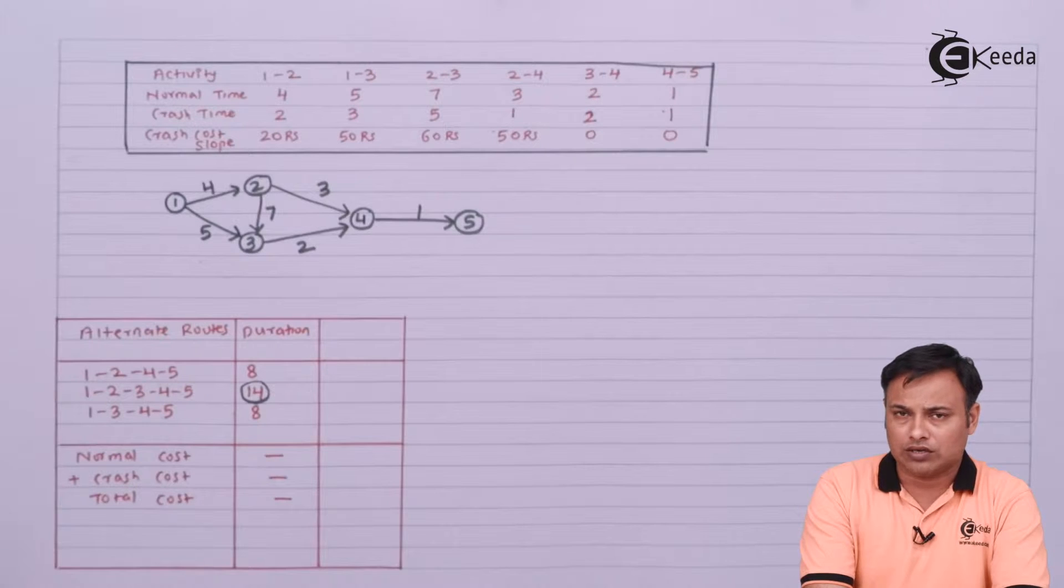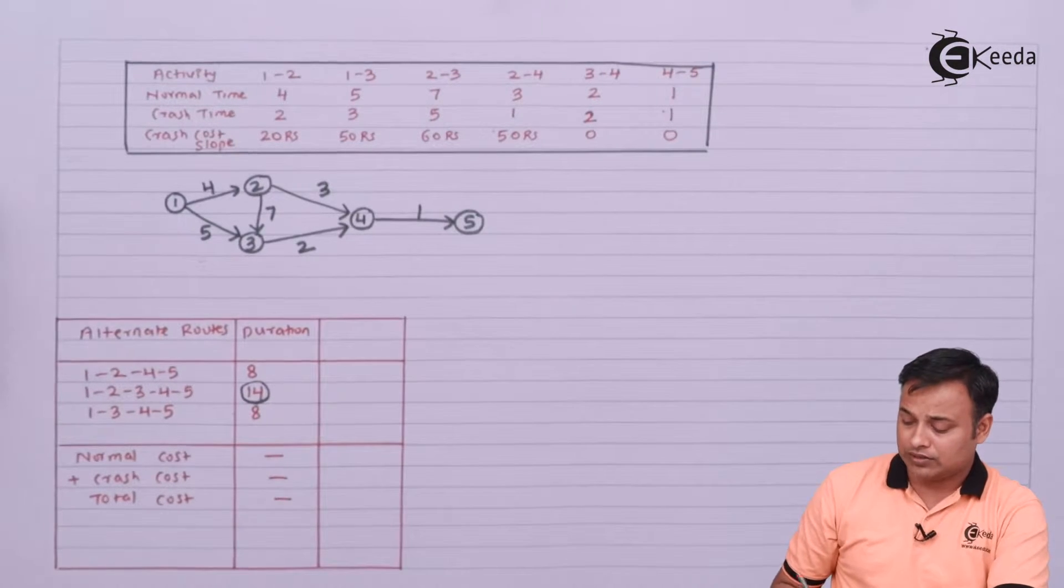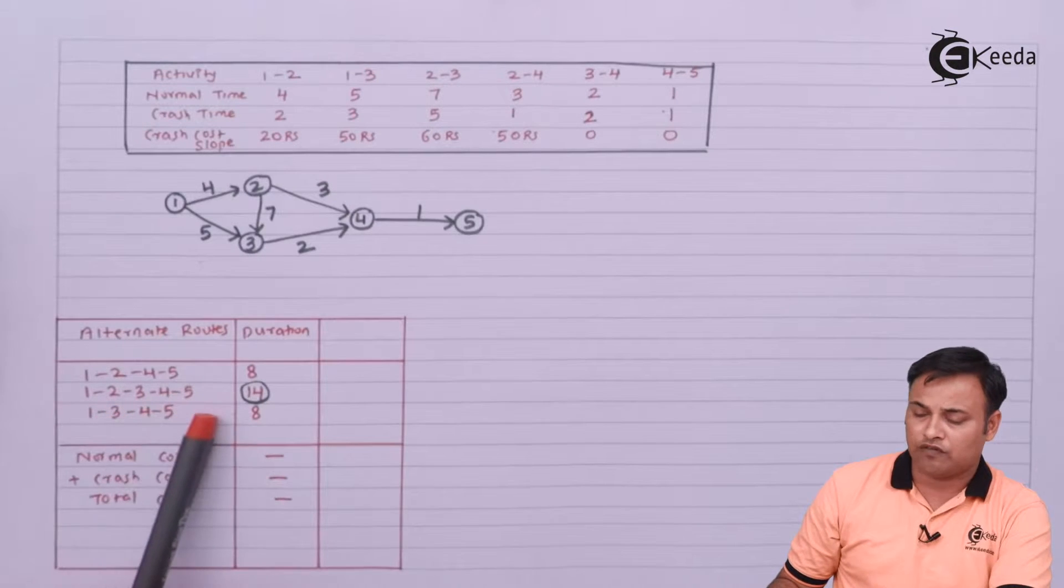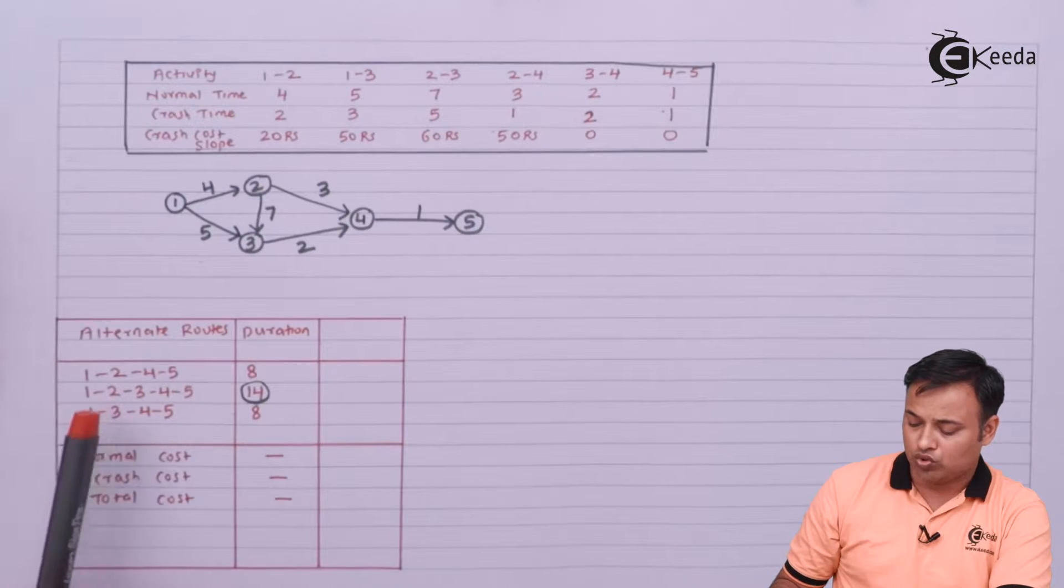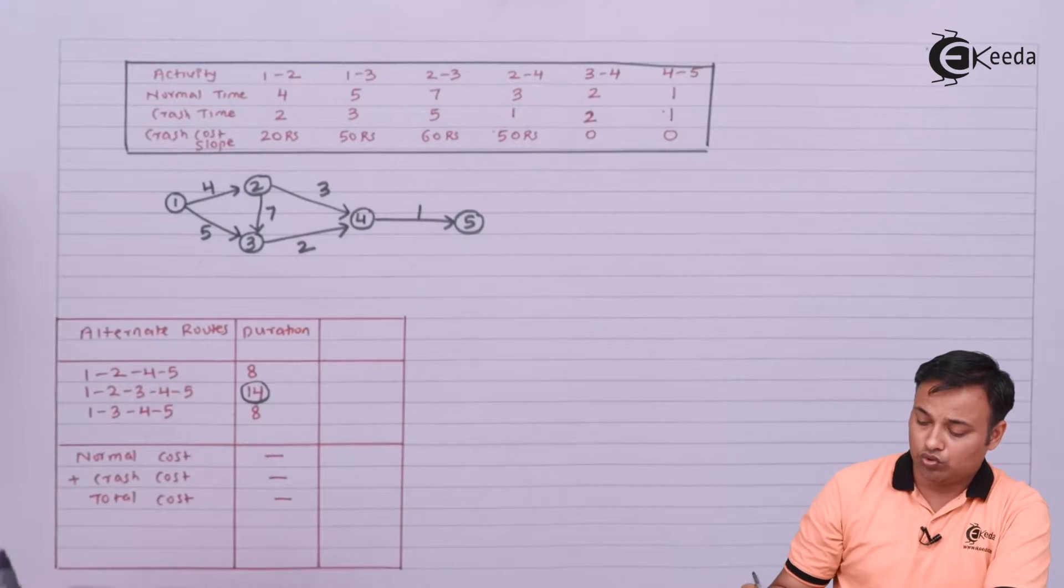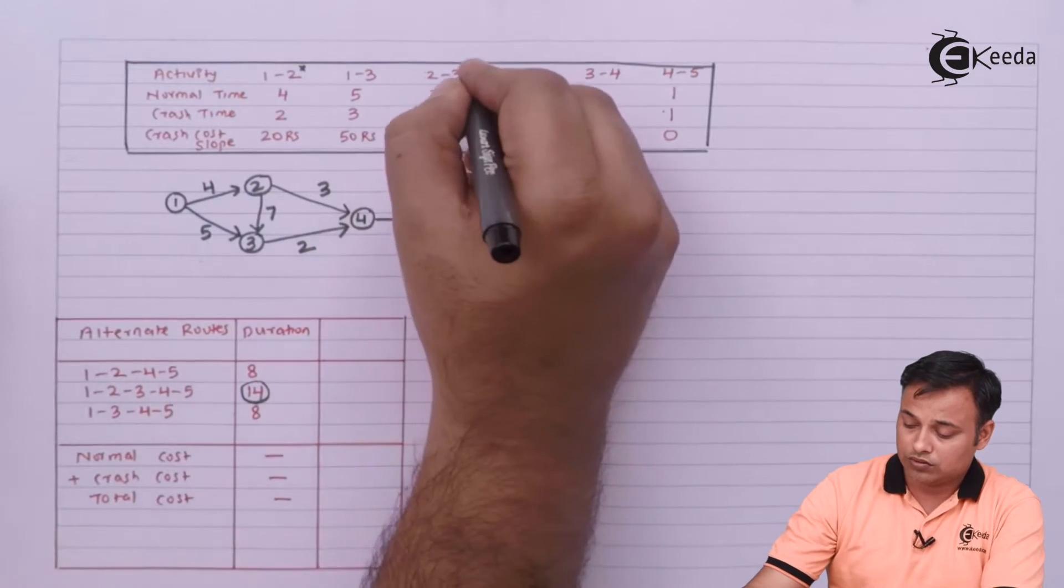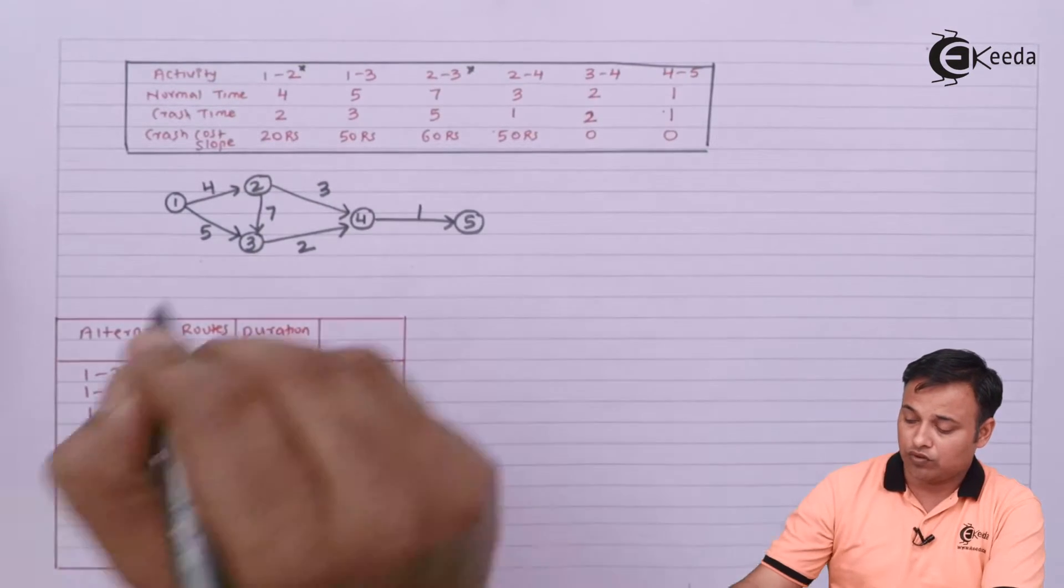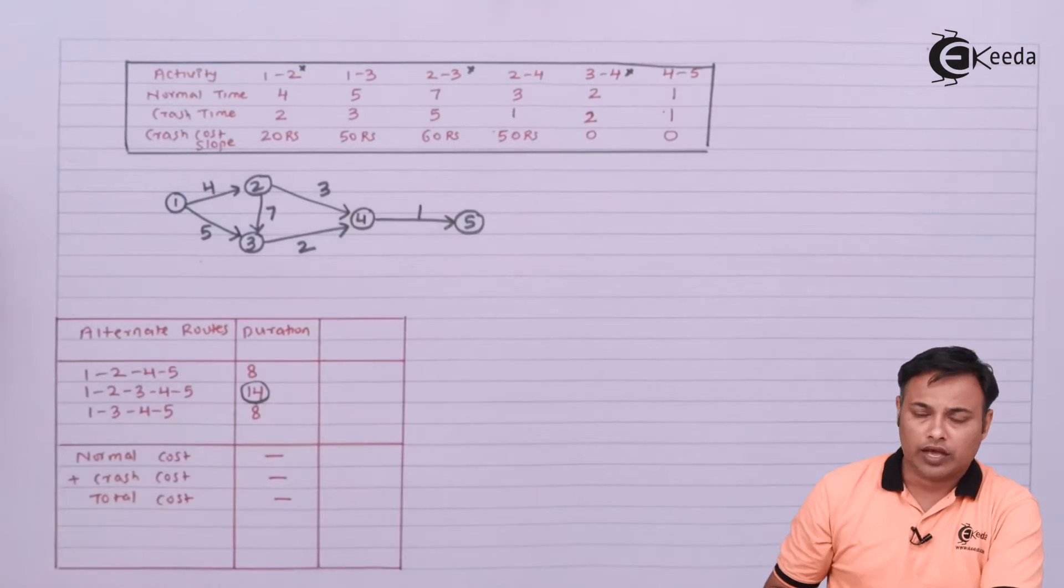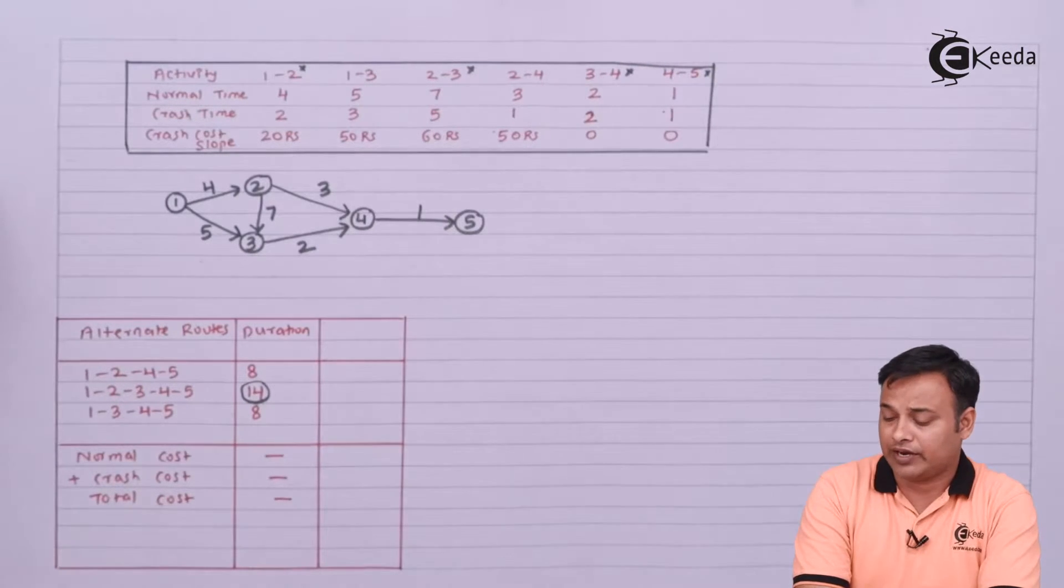Now let's work out the crashing. My critical path is 1-2-3-4-5. So we have 1-2, then 2-3, then 3-4, and 4-5. So we have got 4 critical activities.